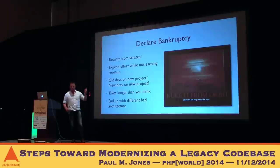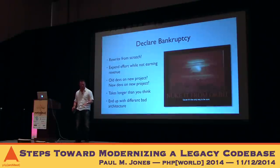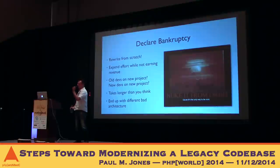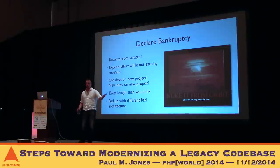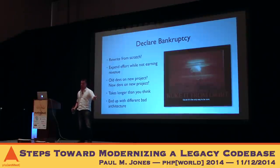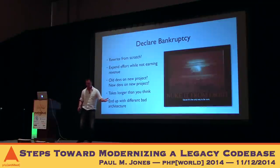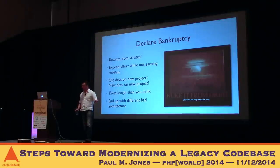If we do a rewrite, it's never quite as simple as you think it's going to be. The first problem is that if you take the developers you've got now and start them on a rewrite, they're not going to be doing any work on the old project. That means the old project bugs don't get fixed, features don't get added, new customers don't come in, and the existing customers — not getting their bugs fixed — leave. So you're spending a lot of effort while not earning any additional revenue from the project.